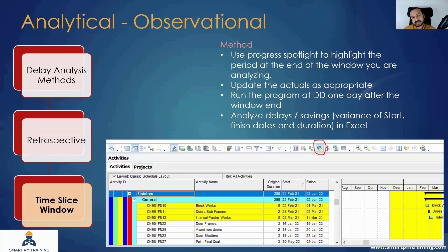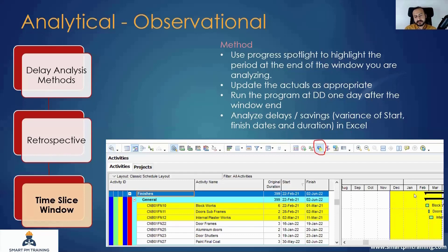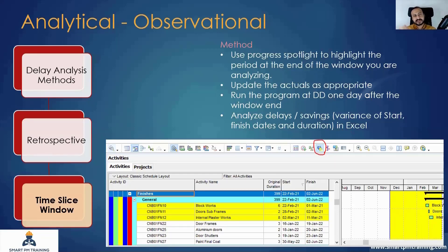For the second window — say end of April, one month after — you use the same schedule you just prepared, with the highlighted activities and same information. You drag the Progress Spotlight to end of April and do the same exercise again, taking the same activities through the same process. At each window throughout the project, you are investigating the employer's delays and the contractor's delays.